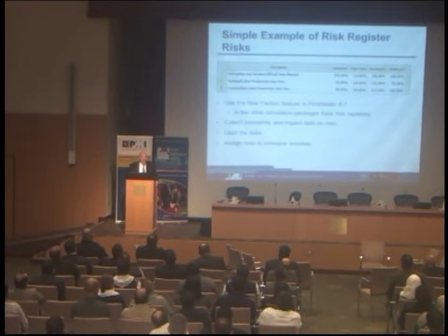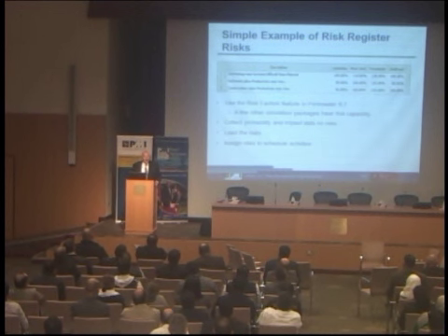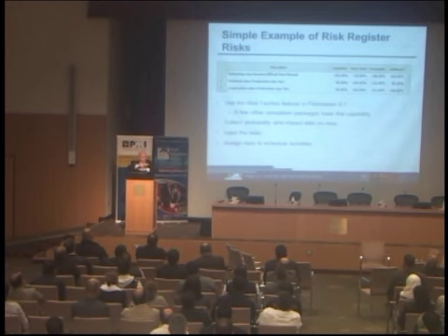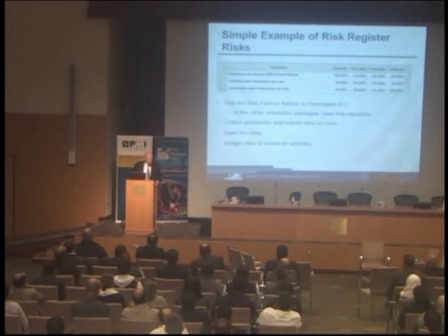I remember a project where even IPA said, if you're in the top quartile of companies doing this refinery type expansion, it'll take 36 months. And management said, I want a 32-month schedule. Now the scheduler, and I know him, he told me he squashed activity durations and put activities in parallel and all that, and gave them a 32-month schedule that everybody on the project called magic numbers and did not agree with, did not follow, had no ownership of.